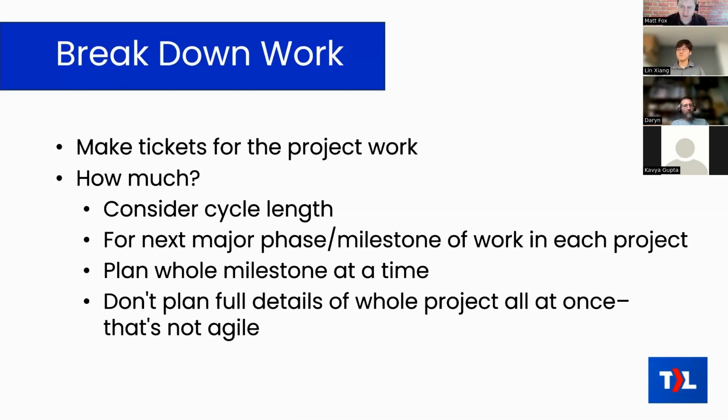If you're doing Kanban, then when you see we're getting ready to start that milestone, now it's time to break that work down. I would always say, always do it for a whole milestone at a time, because then you can think cohesively about what needs to be done as part of that milestone, so that you don't forget it. Because forgetting or not recognizing certain tasks that need to be done for a deliverable is the biggest way to totally bust your project budget.